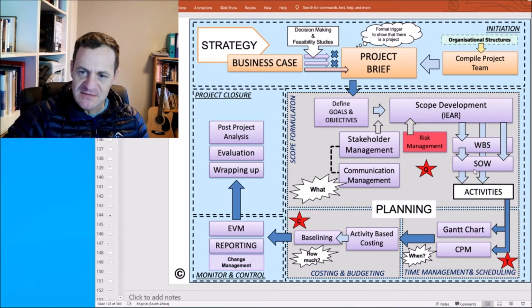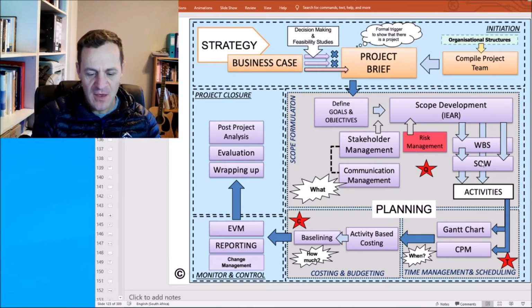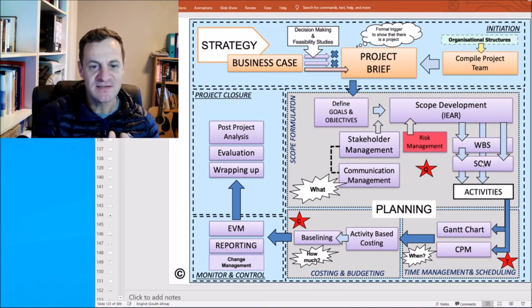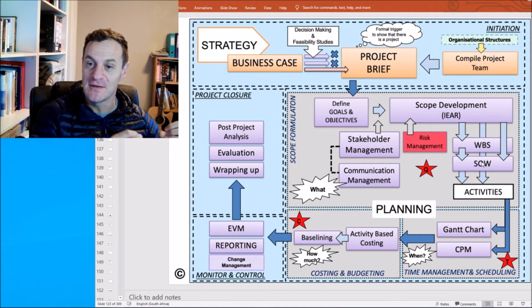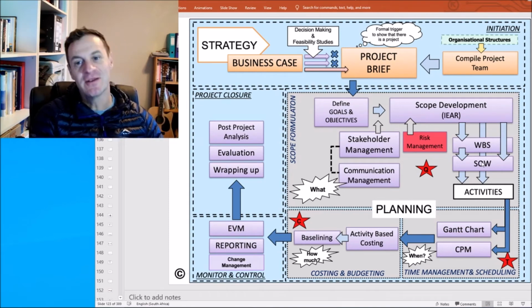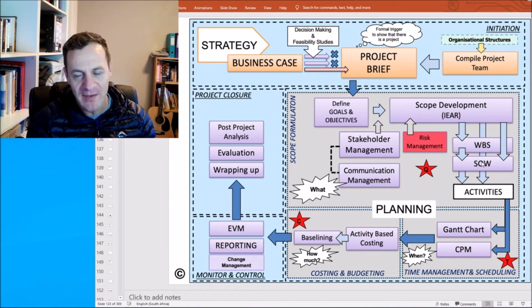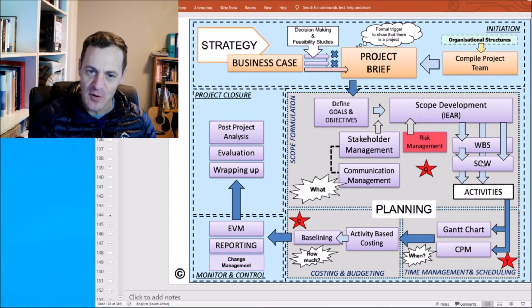So we do that in a systematic way. We go and we say, what is included in the project? Remember, we started at a high level. We say we've got the goals and objectives. So you can say, what is the goal? The goal is there, supported by some objectives. And then you can take that further by unpacking and say, what is now included in these objectives? And what is included in those objectives? What is included in the components? What is included in the subcomponents? What is included in the sub-subcomponents or deliverables or work packages or activities right at the bottom of that?